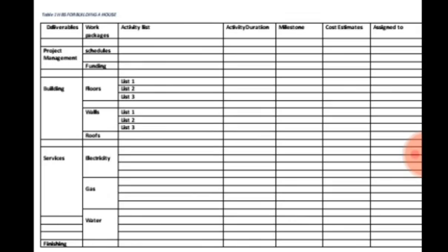You understand? Now, if you keep adding all the days together, the 3 days, the 5 days, 10, if you add all of them together, you'll be able to get the total days that that project is going to take. With the addition, I'm going to be doing that, okay, this project is going to take 66 days, it's going to take 70 days, it's going to take 100 days. So with the aid of the activity duration, you can check the actual number of days that this project will take.